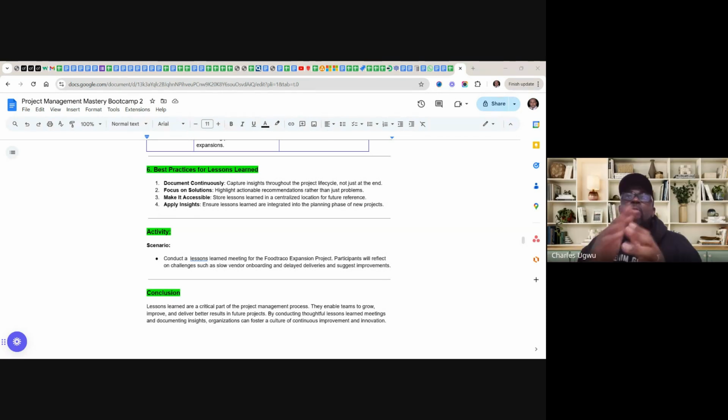During that time, nobody is there, the stakeholders are not there, it is just us. We are now talking to ourselves. Then they say, okay, next time, before we go for the sprint demo, we have to do in-house testing. We have to review, we have to even do code review, do everything to make sure that everything is working so that we don't go out again and embarrass ourselves.